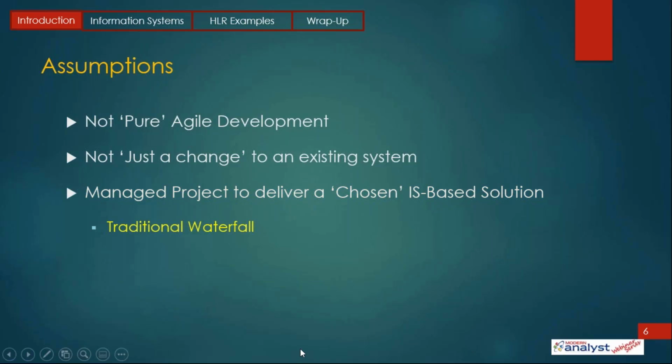So typically that project will follow either a traditional waterfall life cycle, which starts with high-level requirements, goes to detail requirements, then on to design, that sort of thing. Or more popular these days is what they sometimes call an agile waterfall hybrid. And what that means is your business users are really separate from the project. They have their requirements. They need to be documented. They need to be signed off. And then what happens is the actual delivery of those requirements is treated in the agile format.